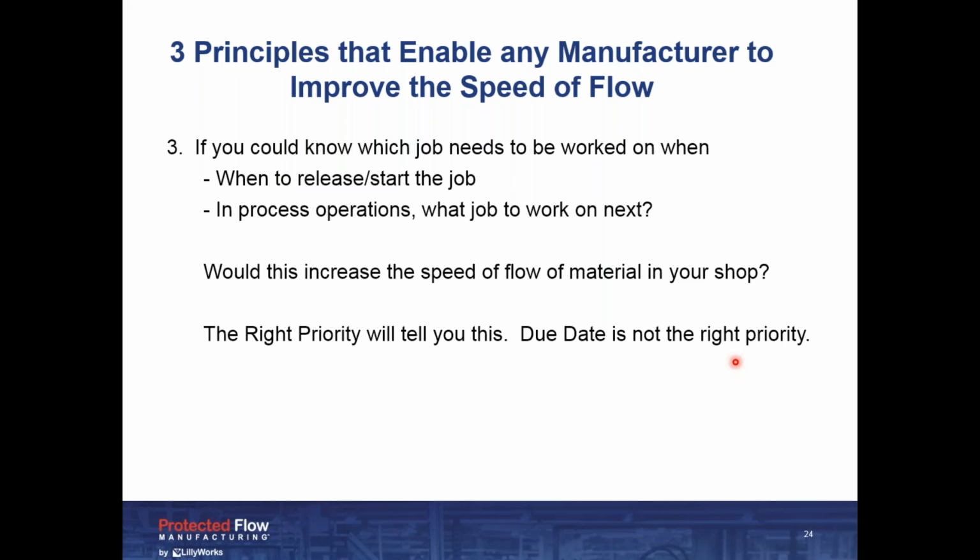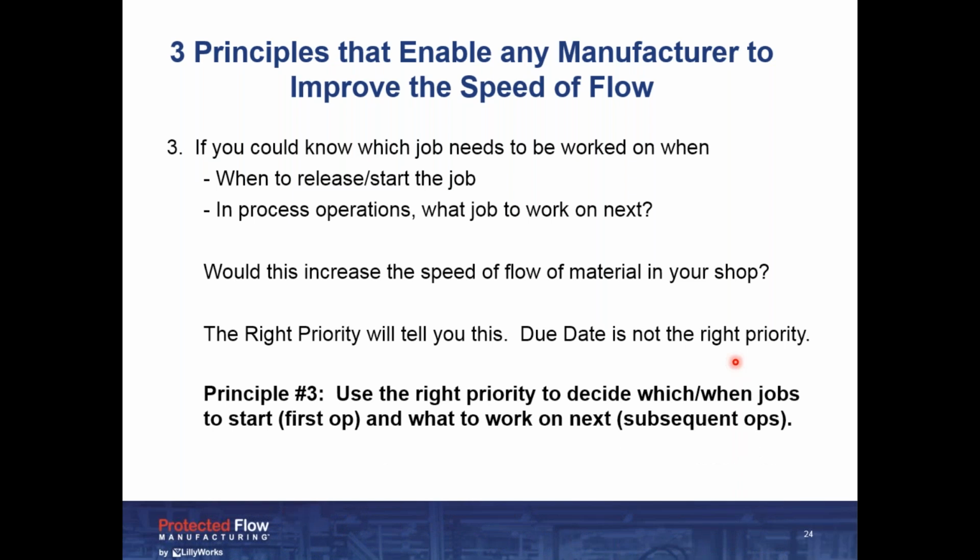So this is what due date is causing. If you're prioritizing by due date, it will focus you on these earlier jobs at the expense of the later jobs that are actually becoming more and more in danger of being late, because you're not paying attention to them. You don't have that visibility of when you should be paying attention to them versus the jobs that are due earlier. So the right priority will show you this, and that's the third principle. This is the third thing we're going to help you with. Those are the 3 principles. Let's see how they work in action.